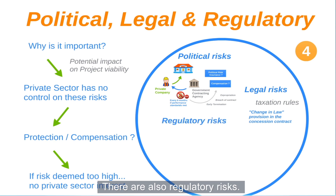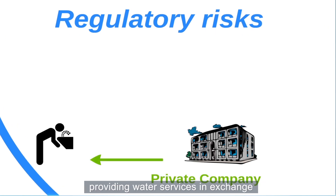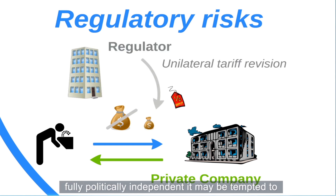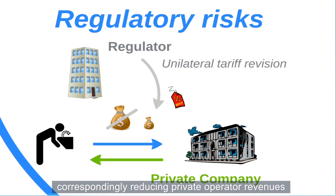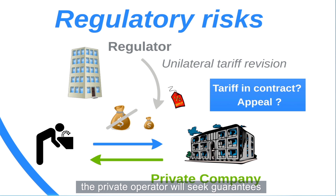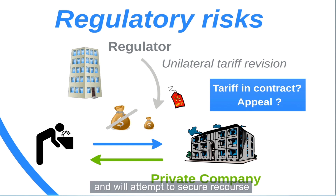There are also regulatory risks. Consider a private operator providing water services in exchange for the right to collect fees from users. If the relevant regulatory authority is not fully politically independent, it may be tempted to reduce tariffs in order to please the public, correspondingly reducing the private operator's revenues and putting the financial viability of the entire project at risk. To mitigate this risk, the private operator will seek guarantees regarding the setting of tariffs — perhaps by including a tariff revision formula directly in the contract — and would attempt to secure recourse against adverse action by the regulator.